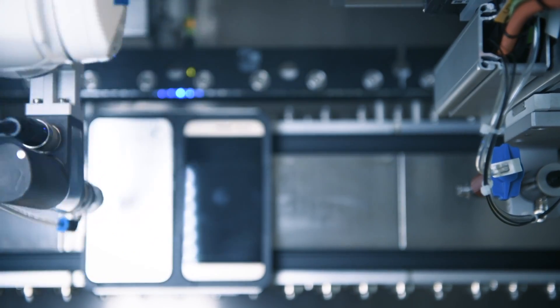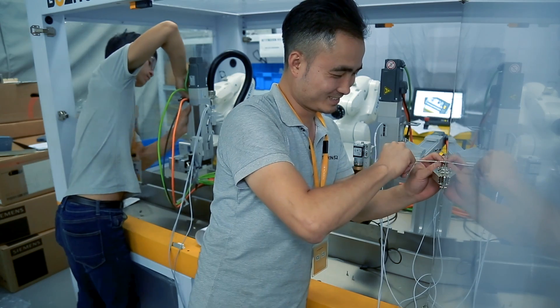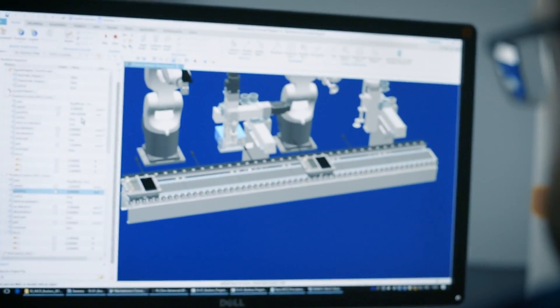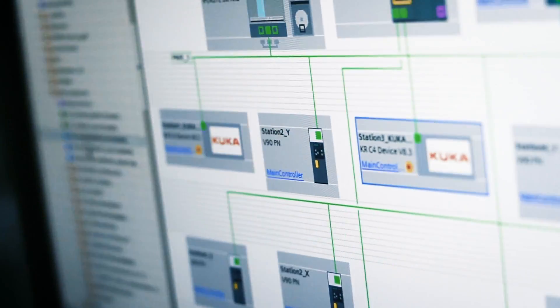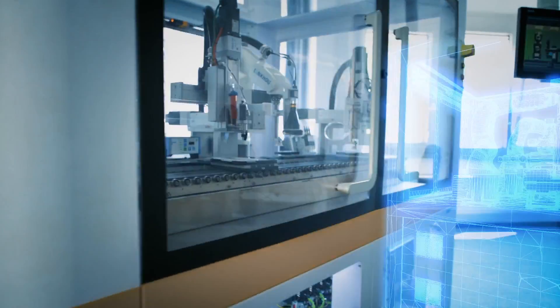What's special about this project is that the machine was designed and built in China while the engineering was handled in Germany based on the digital twin. In the end the two were merged, and thanks to virtual commissioning we were able to validate nearly 80% of the software functions in advance.